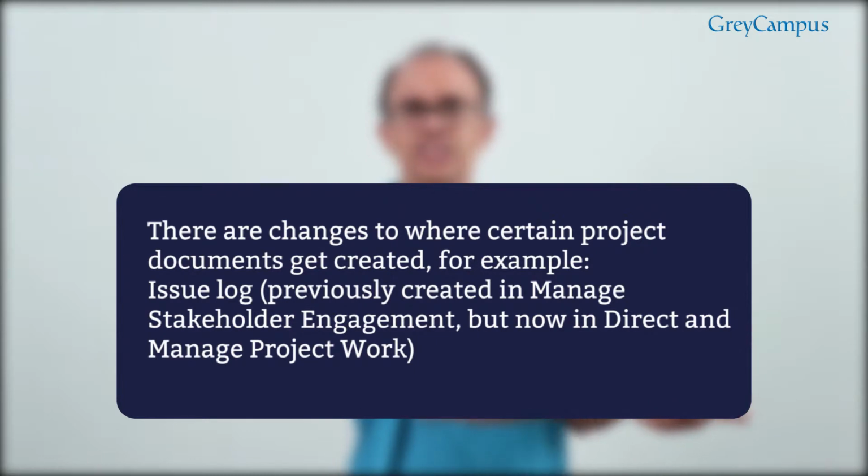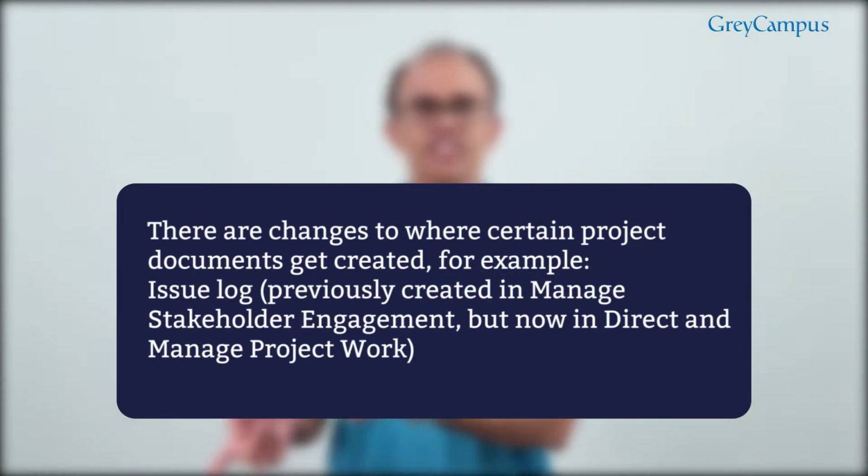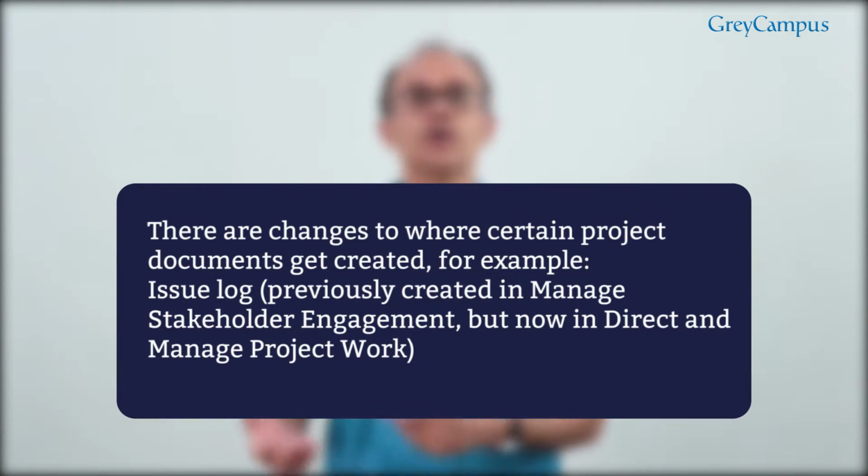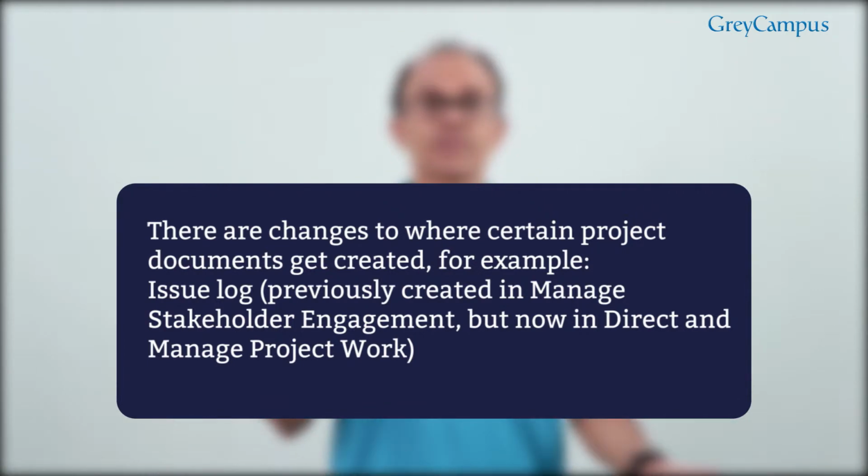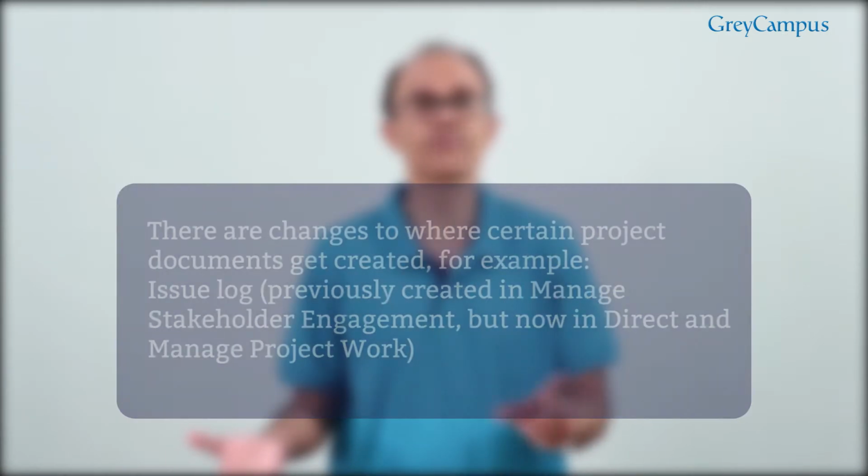One last thing about the ITTOs, some of you might remember the issue log. The issue log was an output of manage stakeholder engagement, but now the issue log is an output of direct and manage project work. Though the issue log can be updated in several processes, this is where it originated from. So those of you who are familiar with the older edition, please be careful. There are changes to where these documents are coming out from. So that finishes off the ITTO aspect.